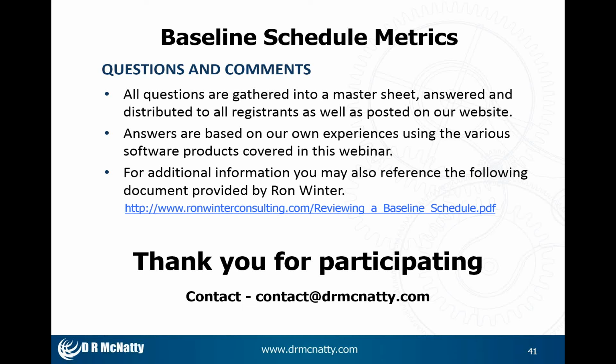All right, and we had one more question submitted. Can you go over the best practices for deleting or adding activities in updates while maintaining the validity of the baseline? I don't like deleting activities. I think you should lay the foundation for expanding your activities in the original baseline. As I mentioned before, if I have an activity A100 that I want to detail down in the future, I will leave A100 in the subsequent update, make it into a hammock or a level of effort activity, and then I will build the detail under it for A100.01, .02, .03, whatever.